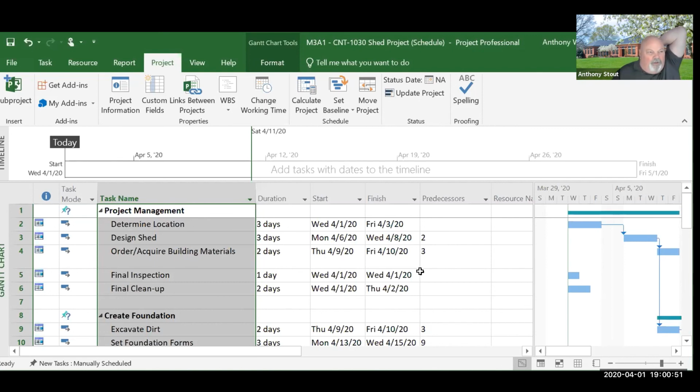When you're allowing it to manage and you're looking at the end date, you typically definitely want to use auto schedule. If there's something that you want to keep an eye on that's not in the critical path, that's not really going to impact the end date, that you're essentially just keeping track of things, then you can manually schedule that. For instance, we may keep track of our construction meetings, and those are not impacted by the construction events. So we may put them as manually scheduled so that they never move and they're not impacted by something else. Does that make sense?